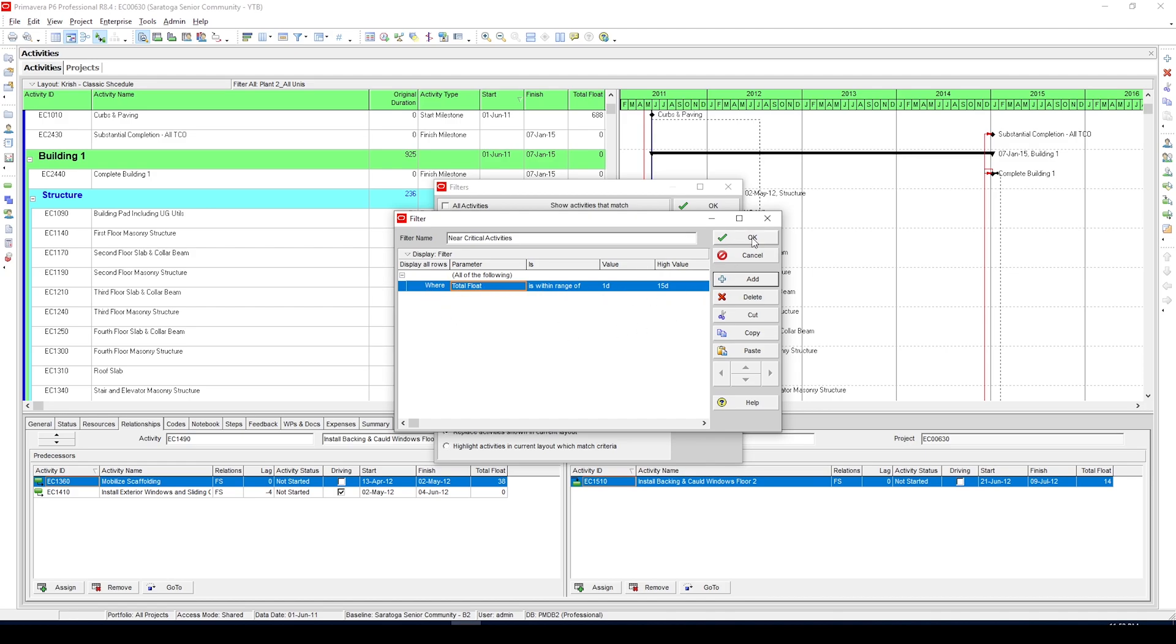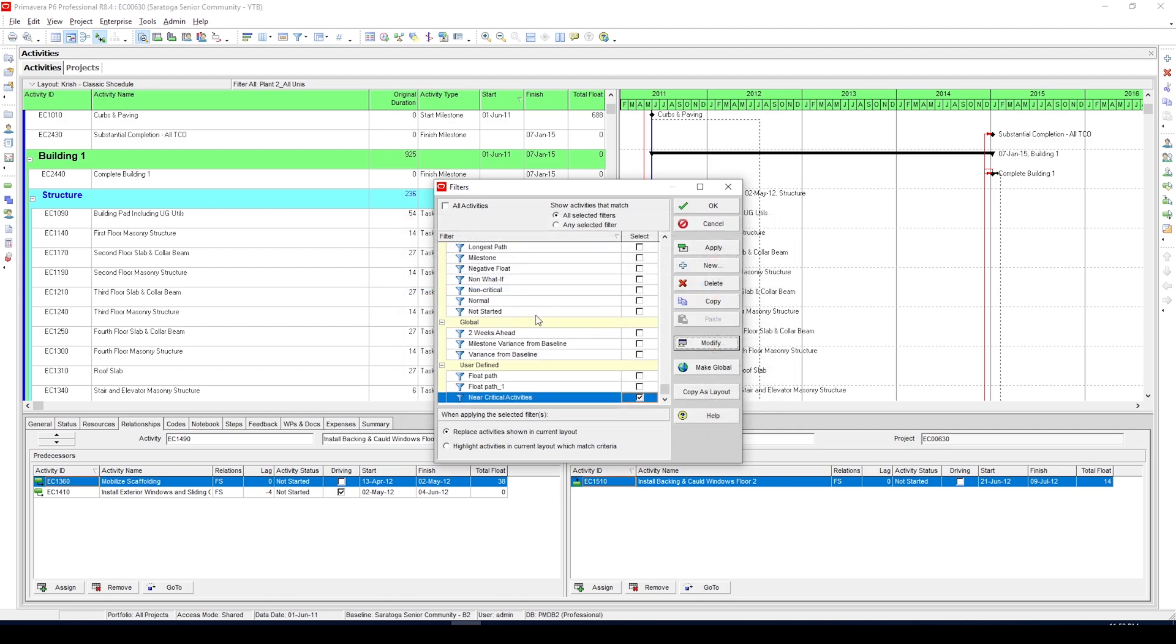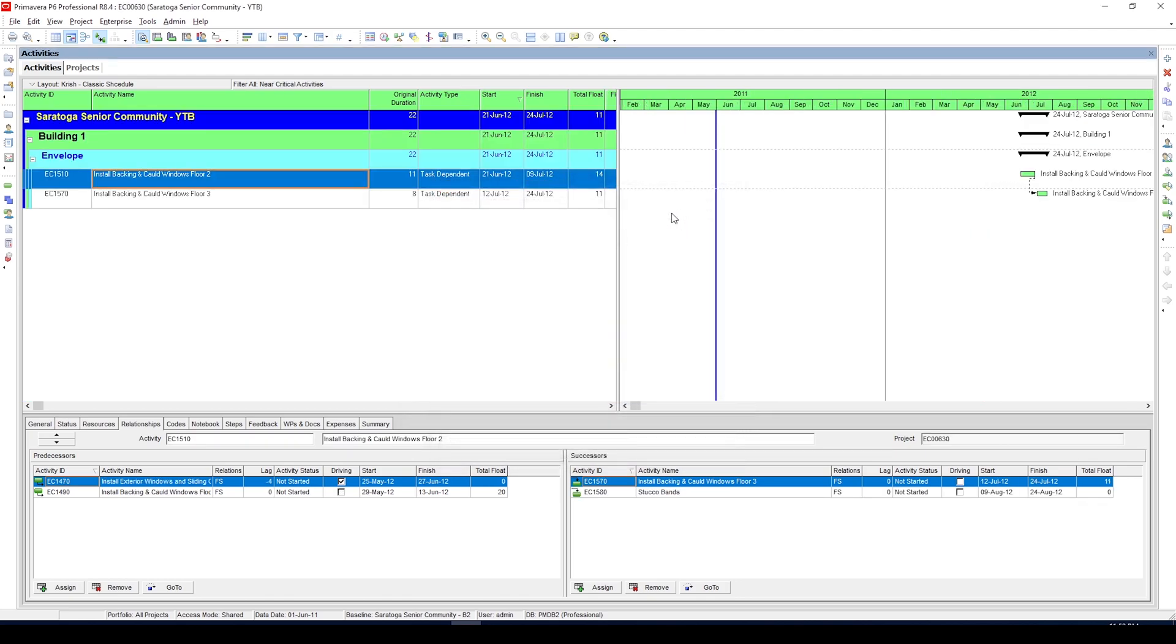Click OK and click OK again. So what P6 is doing is filtering the activities with total float between 1 and 15.